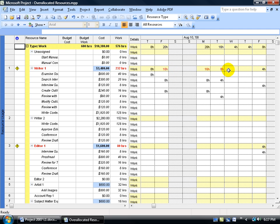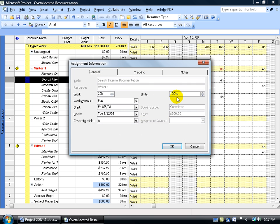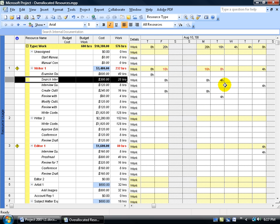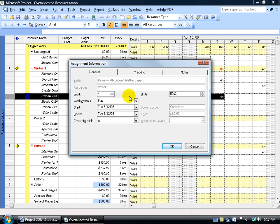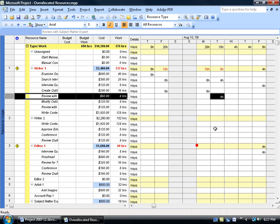But what about this one — why is 8 hours in red? Isn't the default calendar an 8-hour day that allows working 8 hours? That depends on how you assign the resource to the task. The first task at 4 hours — double-clicking shows it was assigned at 100%, 8 hours a day, but he's only at 4 hours. The next task — Review with Subject Matter Expert — was assigned at 50%, which is 4 hours. So 100% plus 50% is 150% — he's over-allocated by 4 hours.